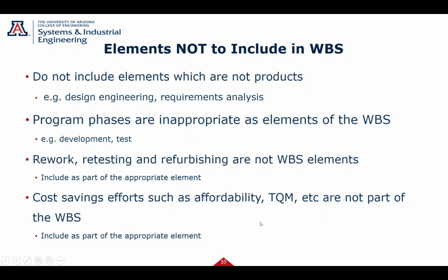Things you do not include in the WBS. You do not include elements which are not products. For example, you don't have a box that just says design engineering. Okay, what does that mean? What is the product? You might have engineering drawings under the radar, and you might have radar requirements. The analysis to get that requirement might be a work package, but it is not one of the products.